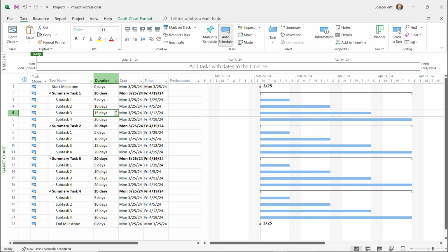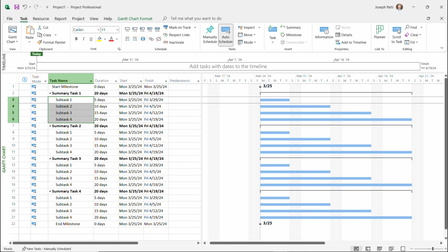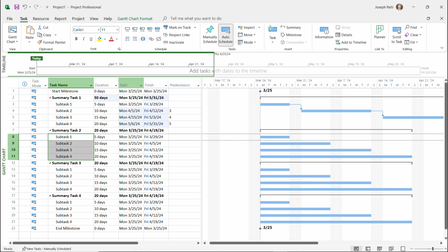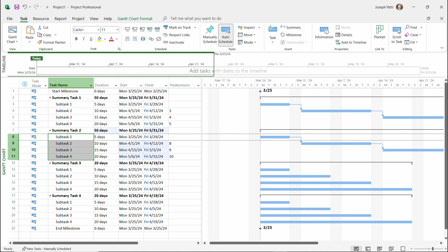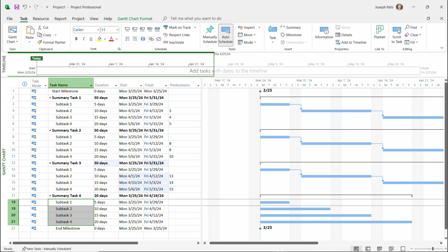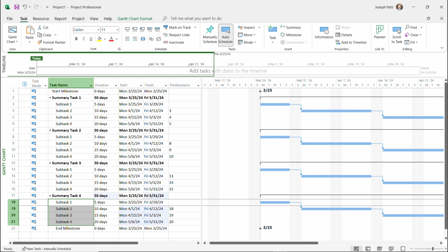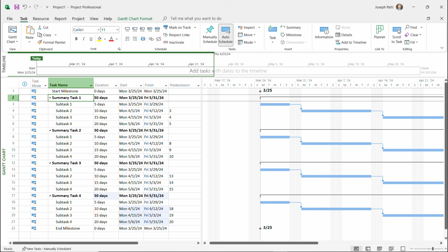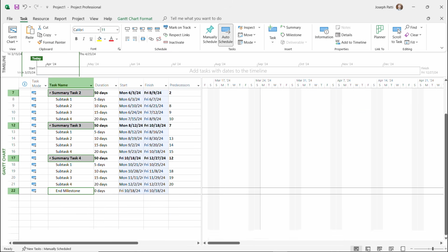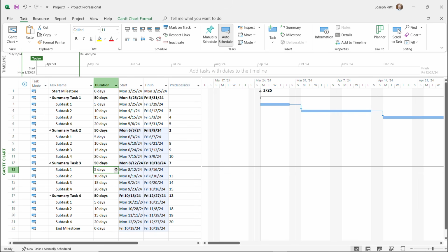And then you can start to create the relationships between these. Remember, you just click the link icon, and I'll just do that for each of these. And it keeps everything very uniform. 50 days, 50 days, 50 days. And of course, they'll just start filling that stuff out. Once we have this, don't forget your summary tasks. Hold down the control key to select all of those. I'll even associate it with my milestone. And there it is. It's looking great.